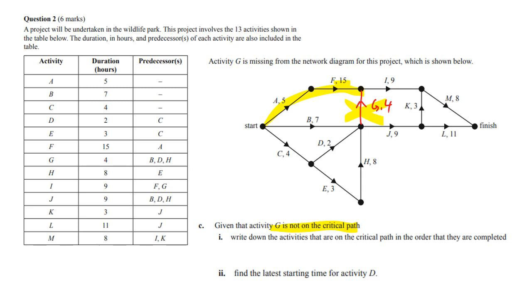And look, there's this horrible 15 up here, which is quite a large number. So just to get to this point is 20. And then following that just straight across, you've already got yourself, what's that, 37? So just adding up the 5, the 15, the 9, and the 8. Is there anything that's going to be more than 37? I can't really see that happening. You can try other paths. We're just eyeballing this.